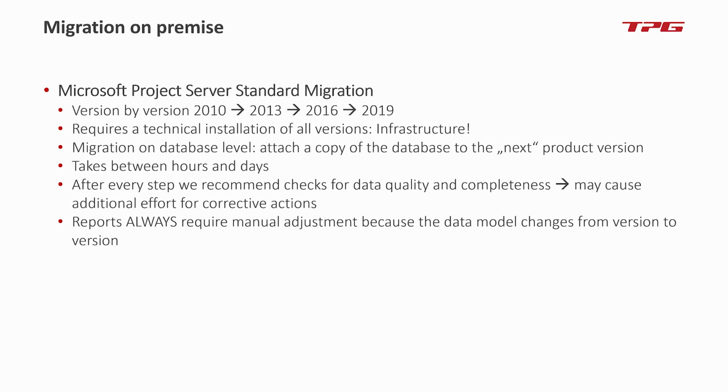So whenever you build Excel reports, for example, or reports in SSRS, SQL Server Reporting Service, or any other tool, you probably will have to touch them again. That's something I would not recommend in the intermediate steps. It doesn't make any sense as long as you are fine on data quality. I would only recommend to do this on the very last step. So this is really a waste of time in between, but you will need to plan some effort for it, that the reports need to be adjusted.